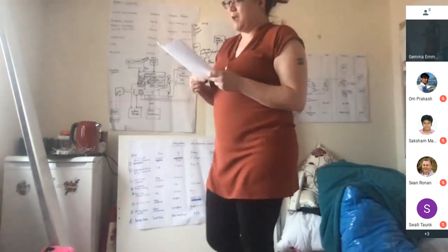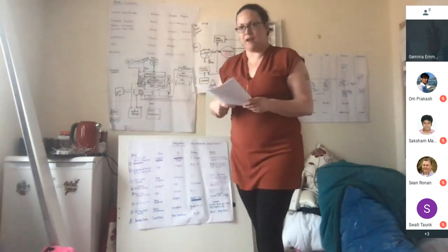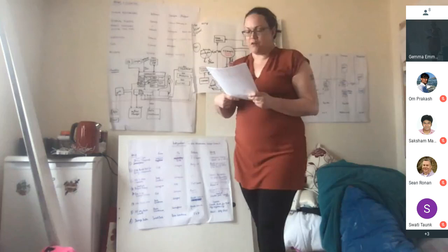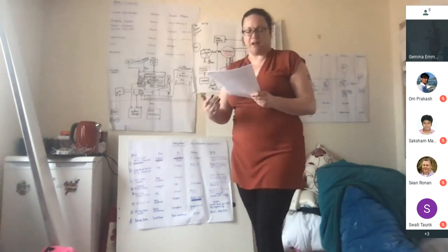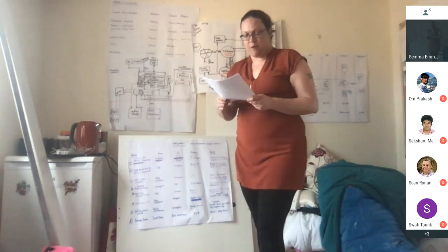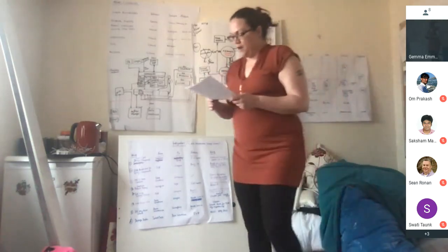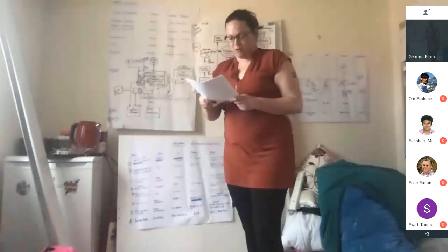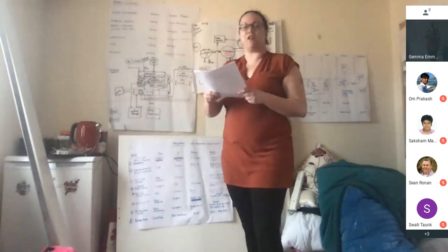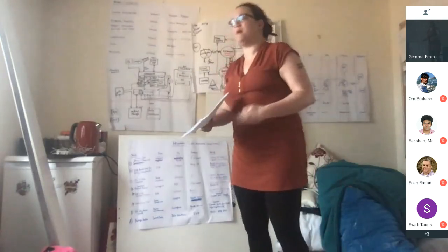I would recommend that we have product owners for each of those 2 sections, and that enables the clinical research SVP to focus all of her budget on the clinical trials and act as an executive sponsor for that particular work stream. I would expect each SVP to sponsor and fund each of those work streams, with the global CIO acting as the accountable party whenever they're asked about this initiative.